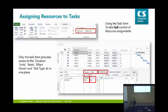That's an effort-driven example. A non-effort-driven example is a training class, similar to this. Every person in here is spending 1 hour. So at the moment we've got 1, 2, 3, 4, probably about 25 hours of effort going into this endeavor today, right? So use that and it will help you to model your assignments and calculate work for you in the product. So in a project, you have tasks that will be this way and this way.